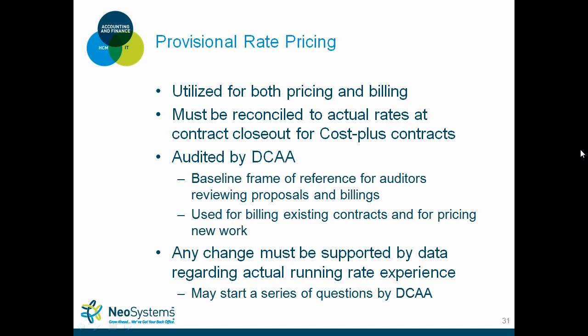So then you plug in those 20 employees, you know what their salaries are, you also plug in any costs associated with those employees, and figuring out what the revenue as well would be for those RFPs if you win, you can come pretty close to what your company is going to look like if you win those RFPs that you're going after. How it works is that, okay, yeah, you might not win one, but then you're going to go after another RFP, so it kind of replaces that. So you can pretty come close to what your company will look like.